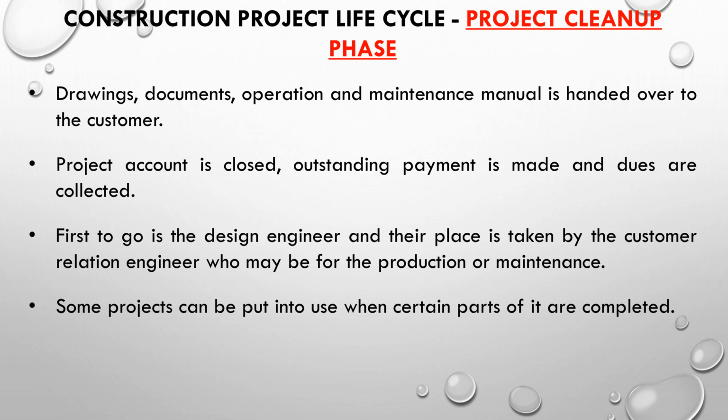The fifth and the last phase of the life cycle of a construction project is the project cleanup phase. Drawings, documents, and operation and maintenance manuals are handed over to the customer. Project account is closed, outstanding payment is made and dues are collected.